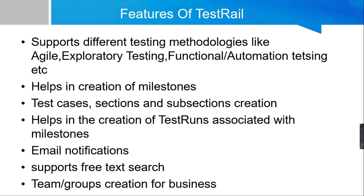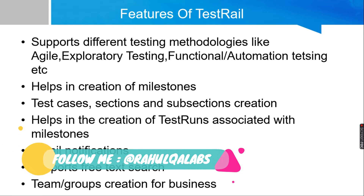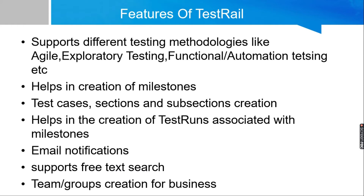TestRail provides the opportunity to create sections and subsections pertaining to your software functionality, and then you can add test cases pertaining to those sections or subsections as per the defined categories for the project. It also helps in the creation of test runs associated with milestones. For example, if you have defined milestones M1 and M2, and you want to release some part of the software in M1 and another part in M2, you can create test runs for each milestone, execute your test cases, and get the report.